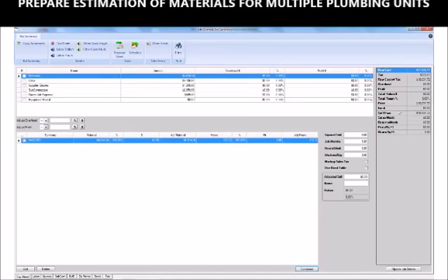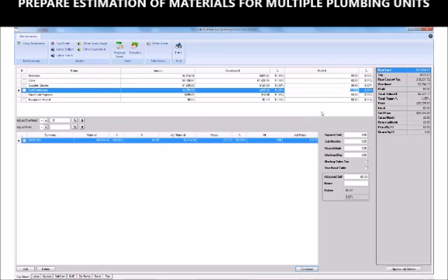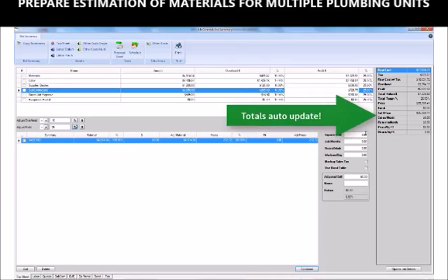If we look down the right hand side, you can see your full job totals. Now we just need to make some money. Let's throw some overhead on here. Here's 10%. I can add it to all of my categories and then simply change individual categories if I choose. Same thing with profit. Let's go ahead and add 25% to all of our categories.